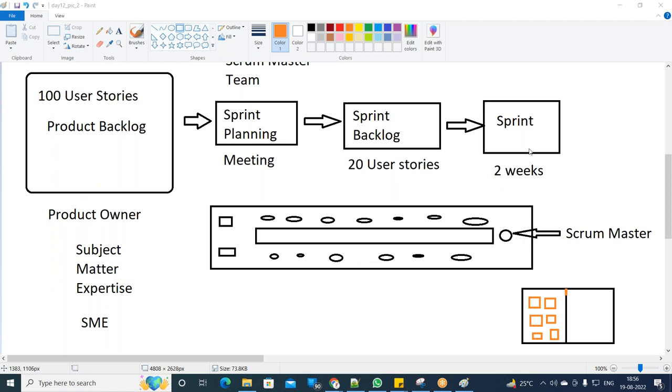Sir, easy to start, sir. Somewhere they have to put, they have drawn the line. Somewhere I have to put, right or left. Because the work that is not done goes on the left, and done goes on the right. Perfect, perfect. Who is this again? Abhishek Srivastava. The work that is not done was there on the left hand side.